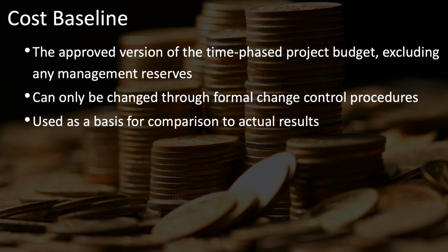Now, as you have changes to your project, those change requests will go through your change control process, and if they're approved, there should be additional money allocated to cover those costs. As a result, your cost baseline will be changed, but only through approved change requests.